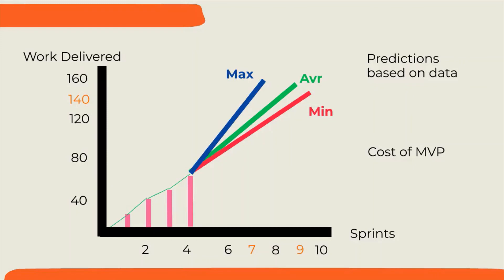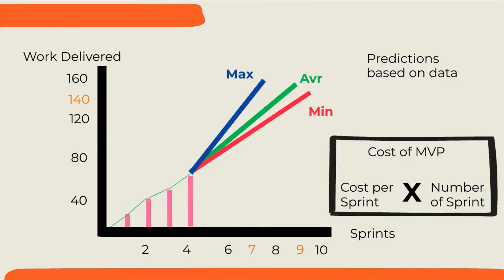For example, as shown in scope-driven planning, we see the MVP can be delivered between sprint 7 and 9. Knowing the number of people working in the team, we can have the cost of the sprints. We simply multiply the cost of sprint by number of sprints required to deliver MVP to have the cost of the MVP.